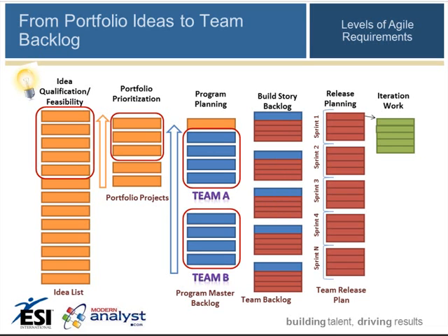The release plan comprises a grouping of a limited number of sprints. Again, it's time boxed. If a sprint represents 2 weeks worth of work, we're looking at some 10 weeks worth of work for the planned release. So we've time boxed the sprint to 2 weeks, and we've time boxed the release to 10 weeks.